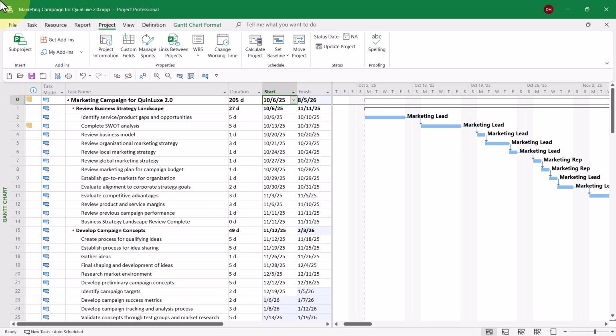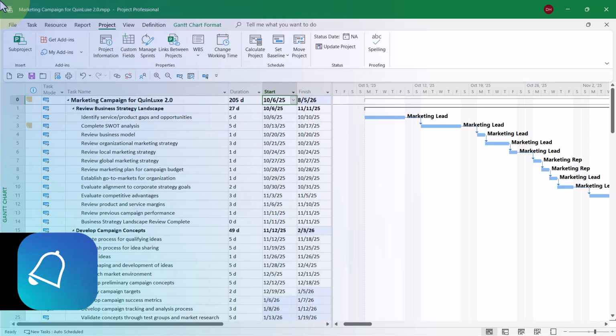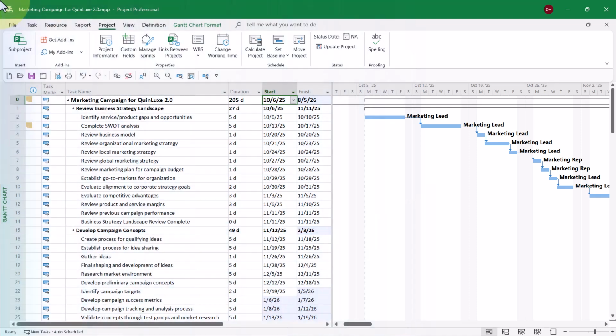Now, the process that I just followed creates what I would describe as an overly pessimistic schedule because everybody is marked as being out of the office during Christmas week and New Year's week. But the good news is, for those folks who do come in and work during those 2 weeks, they can report their progress to you, and you can enter that progress in the schedule. It will not prevent you from doing so.